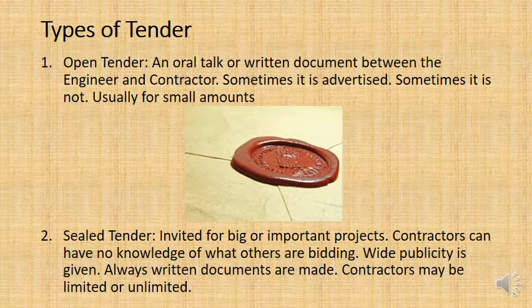Now, all of the other contractors have no knowledge of what others are bidding. And so that's why it's very important for integrity that you do not open the document. It needs to be sealed until the agreed tender evaluation day. Otherwise, you could potentially tell other contractors and they could undercut the other contractors.